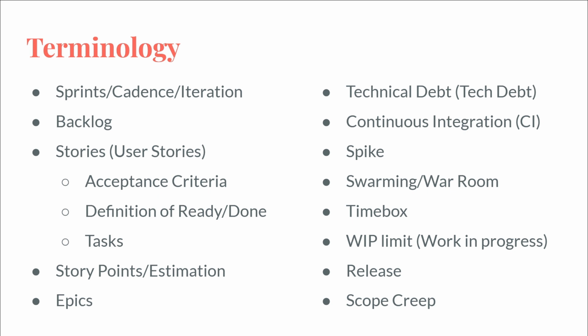Each sprint is 2 weeks. So that's 12 weeks. There's about 4 weeks in a month. So it's about 3 months. So I can now roughly eyeball it and tell our users that, hey, we're going to be working on that. You'll be drip fed some of the features as they're ready, but the whole thing will probably not be done for maybe 3 or 4 months, depending on if anything else comes up or if there's additional work that we didn't account for when we were planning.